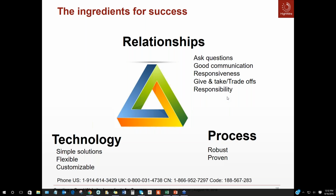Yeah, I will follow up with the questions that are on there. Some are more detailed, so there's definitely some interest in getting a better understanding of that process. Much like you've said over and over, Maya, every project manager on a migration project will consider all the requirements of the publisher and schedule, and the amount of review and what's involved in user acceptance is all part of planning the project out. So it all gets built into the timeline. If the publisher wants to do more evaluation or there's more complexity to the content, you just need to build in more time for that launch period of review, right?